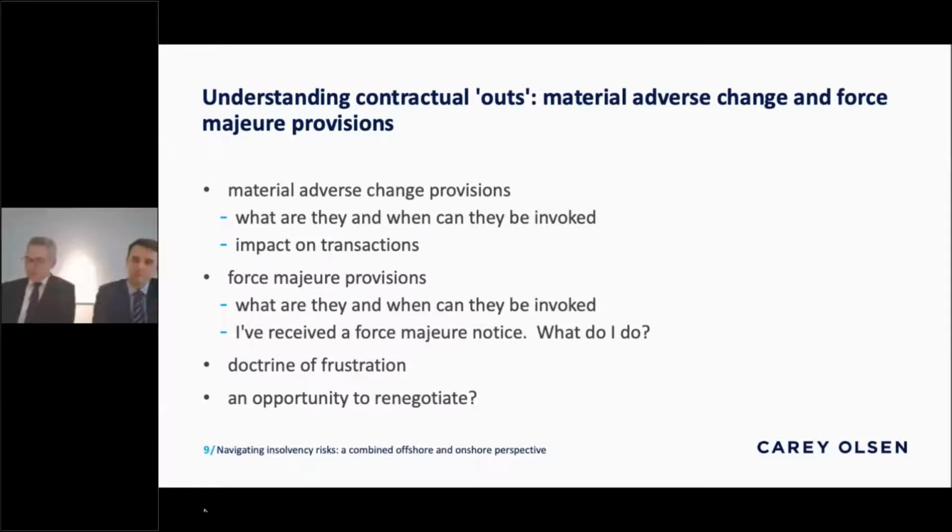Two of the key circumstances which unsurprisingly have been focused on a lot recently are, A, whether or not epidemic or pandemic has been included in the force majeure provision, and secondly, a common provision is any law or any action taken by a government or public authority. This one has been focused on because clearly where a government has suspended travel, or has asked businesses or factories to close, it has had a very clear impact on the ability, particularly in the manufacturing sector and supply sector, for supply chain agreements. So look out for those types of provisions in the agreements.